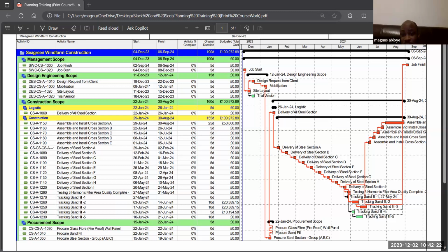Even as I'm looking at my project, I will say, all the delivery sections, why should they carry almost 50% of the project? Delivery is taking 50% of the project, and assembling the project is taking only 20 or 30%. Something is fishy. So those are things, but in summary, it's a combination of everything, and you can filter out the non-criticals using just a click of a button.